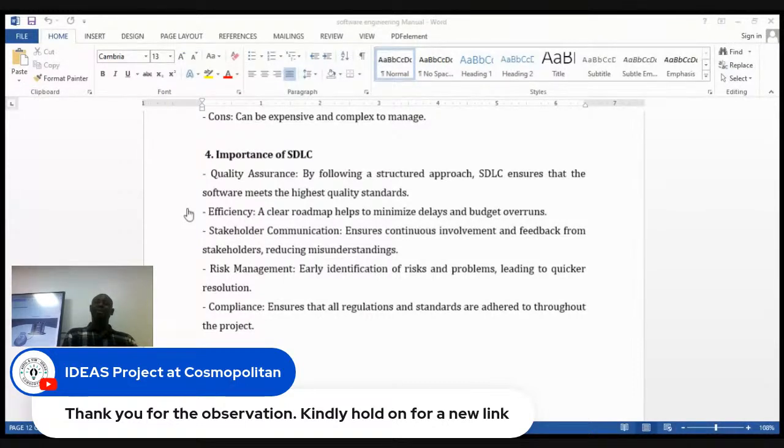So you can see that by the time you check it, okay, only you is taking 900,000, and maybe you guys will be 4 in building the software. If they are taking the same amount like you, 900,000 times 4, that's about 3.6 million. Then you now consider the hosting. The hosting can be 200,000 or 150,000, depending on the way you want to host it. So by the time you put these things together, you see it's about 4 million.